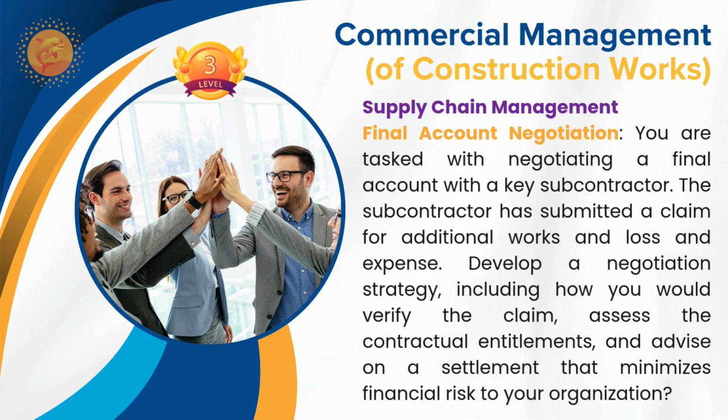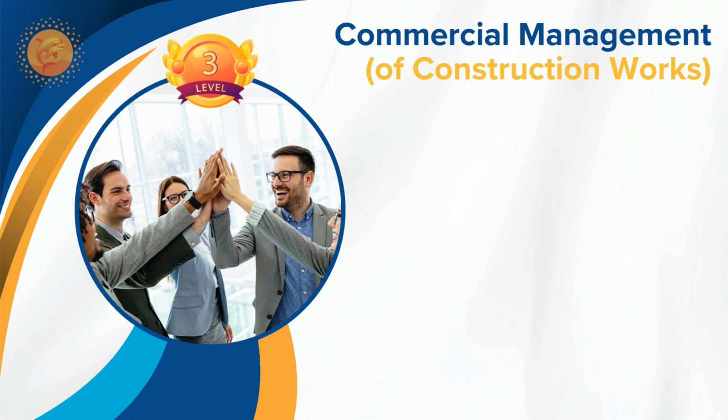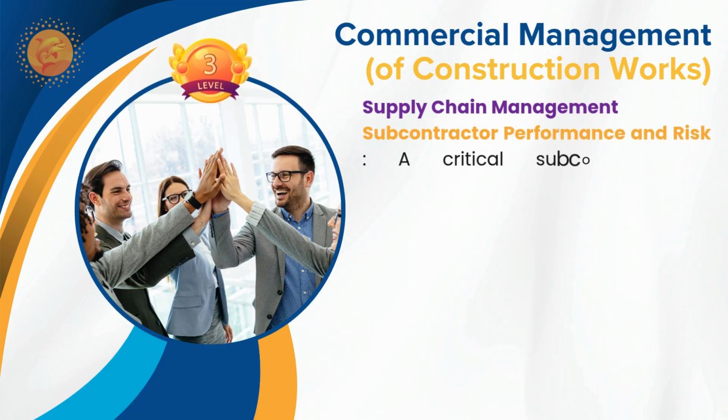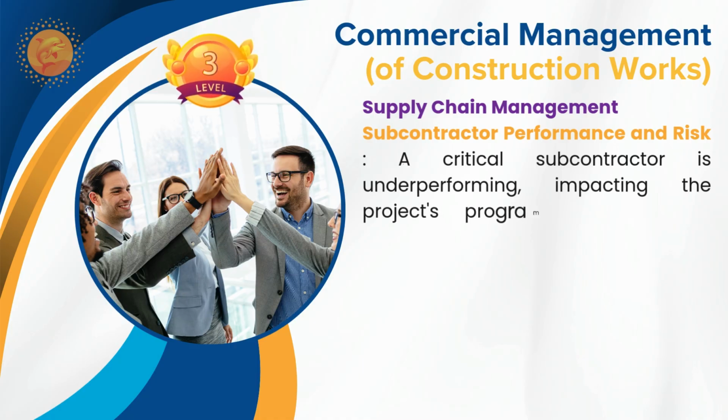The main contractor is not responsible for this because it happened out of his control, and he is not culpable for it. If price escalation or inflation is not covered under the contractual provision, it is always the contractor's or subcontractor's responsibility to include it in their risk allowance, that means contingency within their tender price. So that is the scenario. Of course, they may argue that this is the duration we agreed but it is getting delayed for reasons they are not responsible for, so they have to claim this to the employer only.